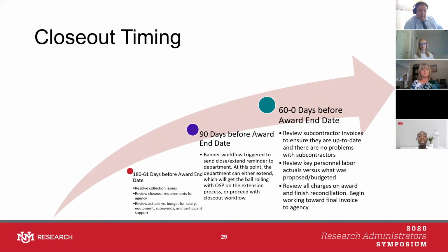And by that time, the key thing you want to make sure of is that you are spending down on the grant based upon the performance period, using the burn rate to guide you to do that. And that the budgeted expenses, your actual expenses, correlate with your budget.